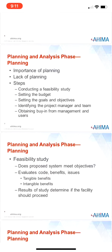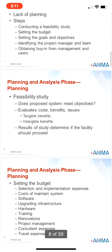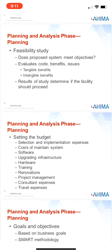Number two in planning is setting the budget. Developing the budget for a system selection project is important as cost is a key determining factor in deciding whether or not to implement an information system. The budget should be comprehensive and as accurate as possible because it is used in the decision-making process. The budget should include system selection and implementation expenses as well as the cost of maintaining the information for a specified period such as two to five years, and items such as cost of software, upgrading infrastructure, hardware, training, renovations to the physical plant, maintenance, project management, consultant expenses, and travel expenses for site visits.